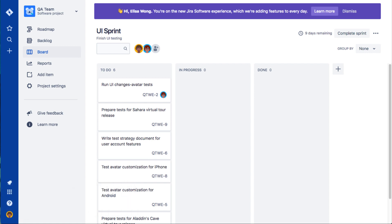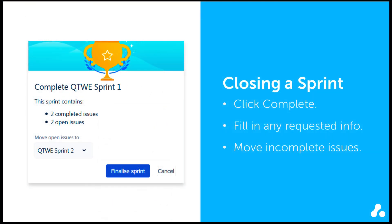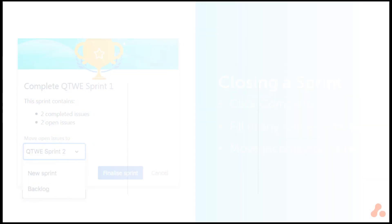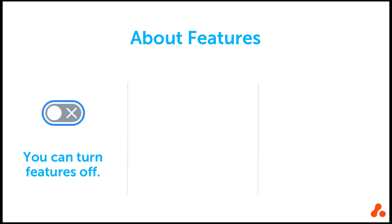The board for a Scrum project works like the board for a Kanban project. If you want to check out how to work on a board, view our video on board configuration using the link below this video. When it's time to close the sprint, just click Complete Sprint in the top right of your board and complete the requested information. If your team hasn't finished all the issues, you can choose to move those to the next sprint if you have future sprints set up, to a brand new sprint, or to your backlog. Note that backlog and sprints are two features your next-gen Scrum board has automatically turned on — don't accidentally turn them off unless you are trying to convert your project to a more Kanban-based approach.